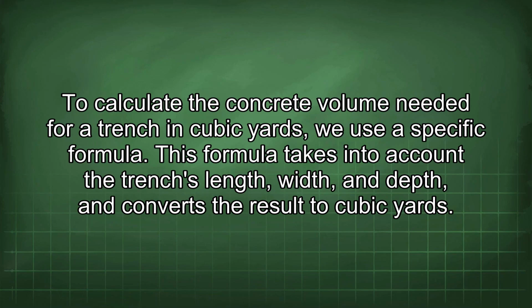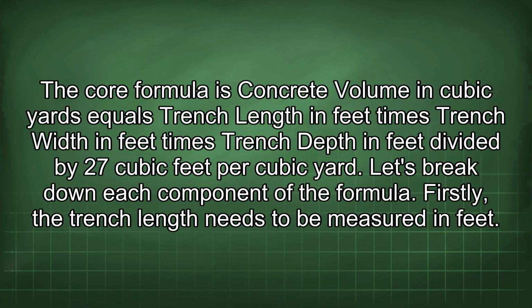To calculate the concrete volume needed for a trench in cubic yards, we use a specific formula. This formula takes into account the trench's length, width, and depth, and converts the result to cubic yards. The core formula is concrete volume in cubic yards equals trench length in feet times trench width in feet times trench depth in feet divided by 27 cubic feet per cubic yard.